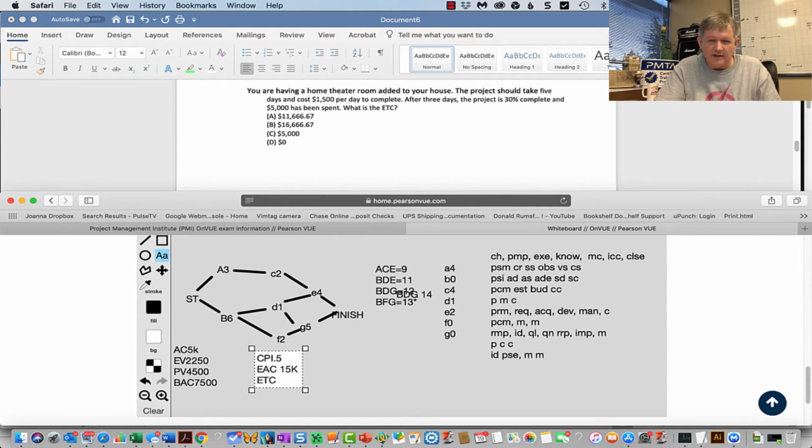So let's see, because I'm getting ready to have 10,000 and that doesn't add up. So let's do a quick sanity check here, because stuff happens. And if this was a perfect, pretty video, I want you to not freak out if something happens. So 5,000 spent, 30% of 7,500, 2,250, through 3 days, 4,500. That seems right so far. So my CPI was wrong.